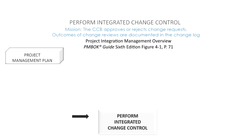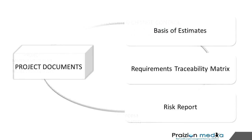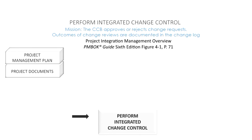Let's take a look at the inputs. First, you've got the project management plan as an input, because this tells you how to carry out the process of performing integrated change control. The next input is project documents — all manner of project documents could be looked at, such as a basis of estimates or an RTM, a requirements traceability matrix. When carrying out a review on a change control board, you'd want to know the health of the project and the areas that could be impacted.